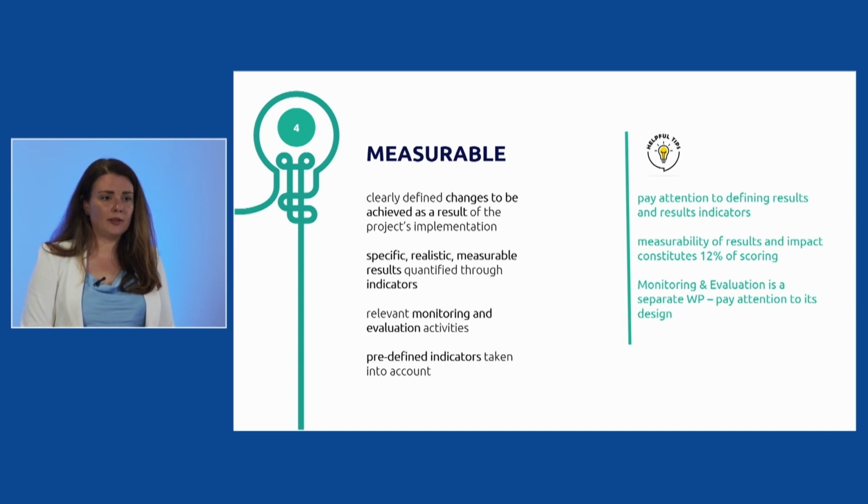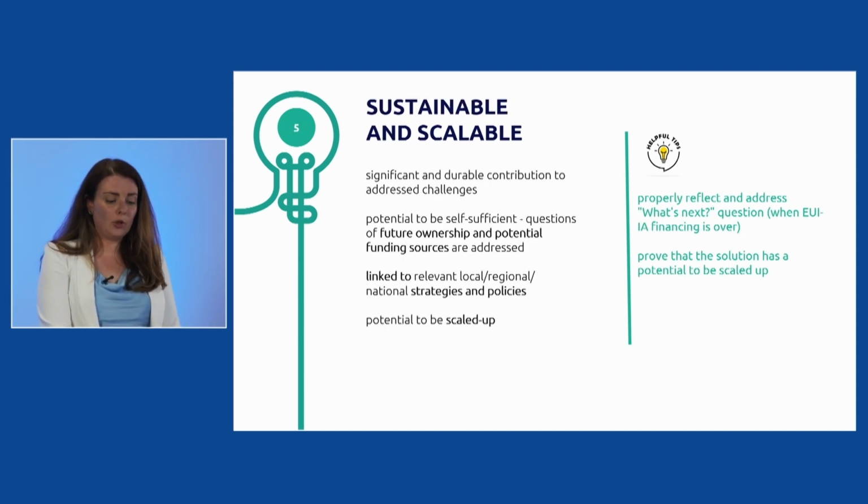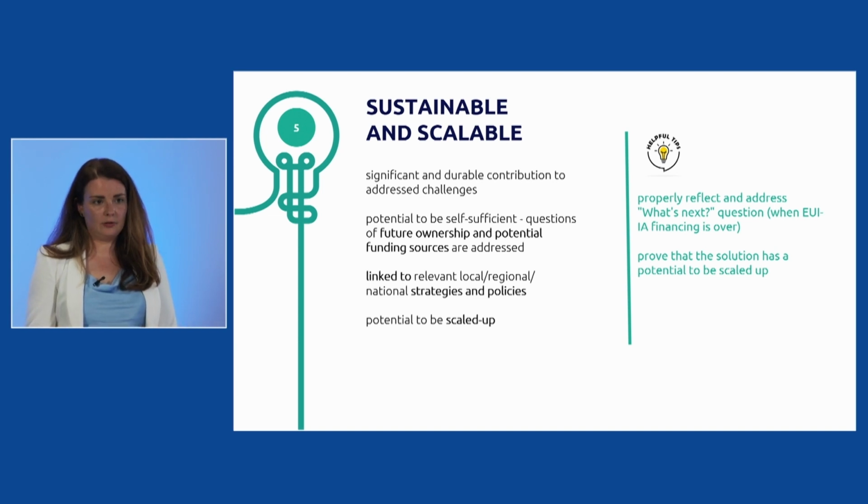And how important monitoring and evaluation is for us, as an important feature of innovative actions, is that we have even a separate dedicated work package for monitoring and evaluation activities. And moreover, we ask you to finish implementation of your project piloting 6 months before. So then the last 6 months of your project implementation can be dedicated to evaluating, to summarizing, to observing your pilot's daily operations.